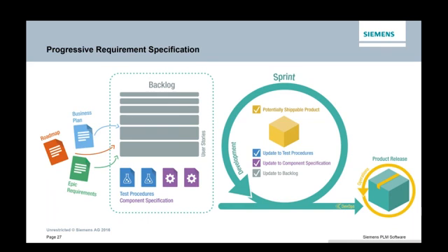So yes, I agree that the most important thing is to define a task that contains the user story. What I think is wrong is to consider the user story as an initial requirement from a customer, because those stories are typically too big, and you need to break them down into small items that are feasible to implement. But once you break them down into small chunks, they become less usable for external communication to the customer, because they will tell you, hey guys, this is too small, I need the full picture, I need the full feature. Why do you break it down into such small pieces? So that's really the case.